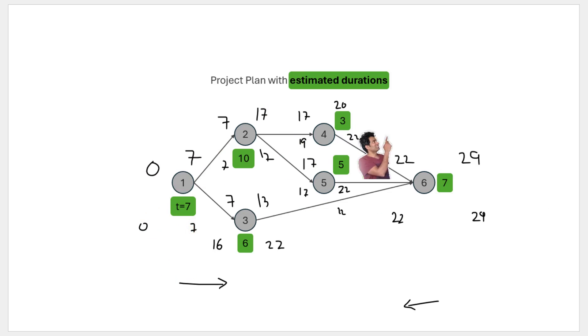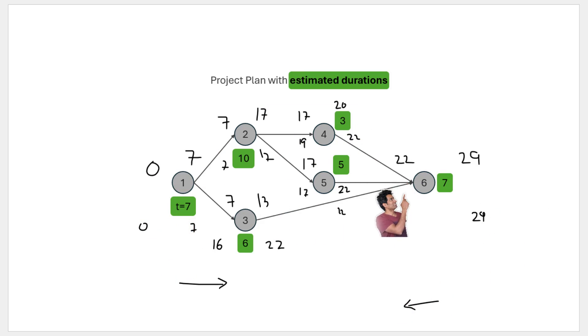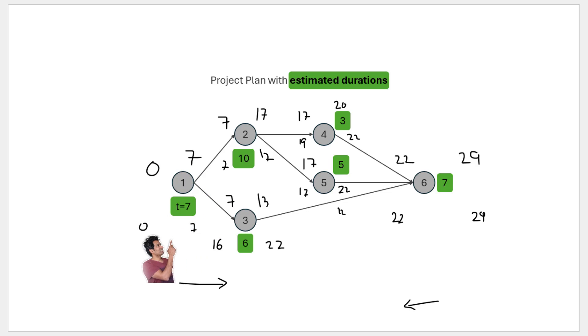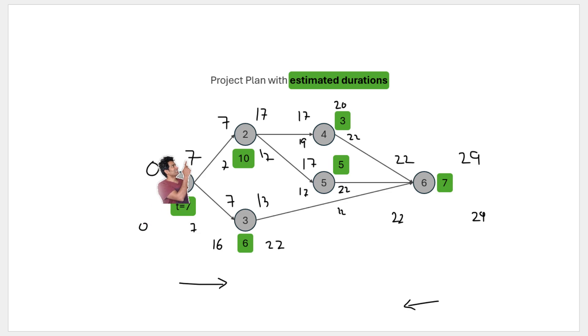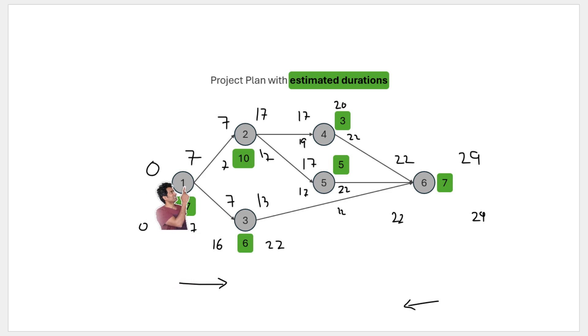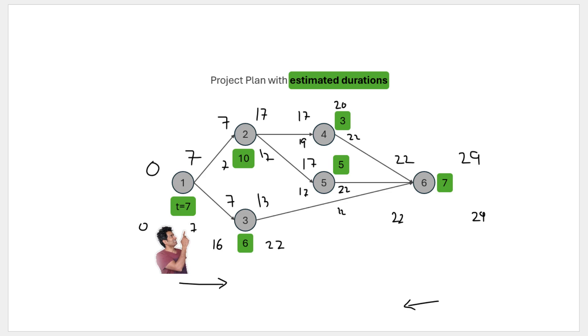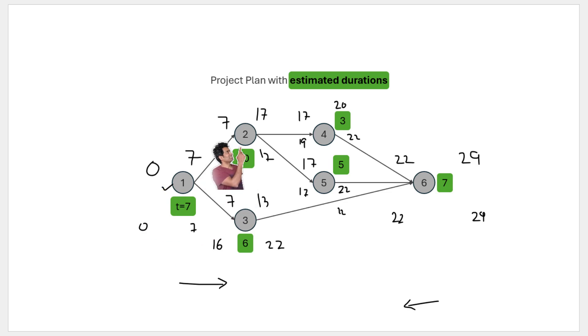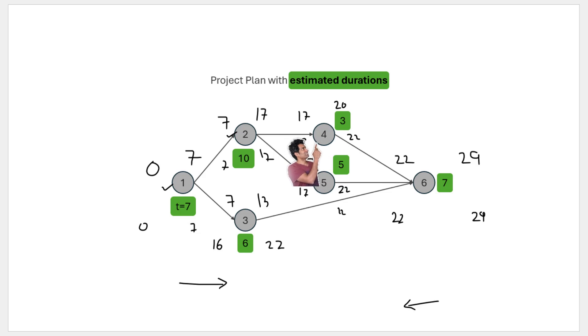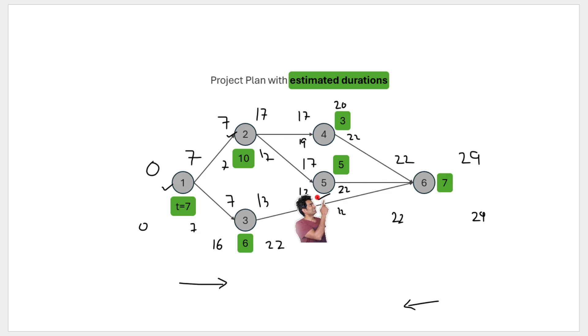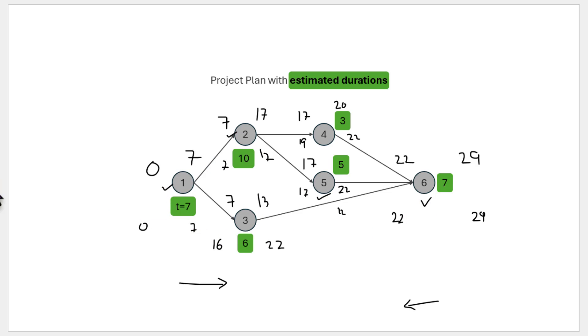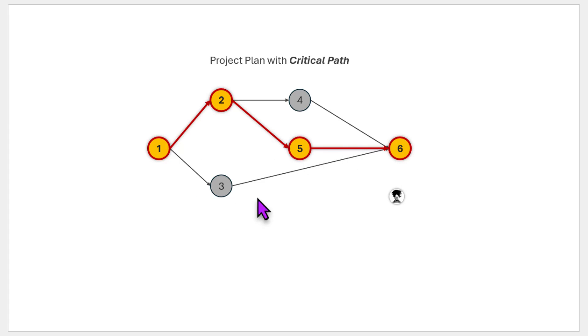Once you have all of these numbers, I know it looks like a bit of a mess, then the activities on critical path will pretty much have the same numbers top and bottom. But essentially we look for the difference between the finish values here. So seven minus seven is zero. So wherever the value difference is zero, those activities are considered to be on critical path. So we can say this guy is on critical path, 17 and 17, so this is on critical path. 20 and 22, so this is not on critical path, whereas 22 and 22, so this is on critical path, and 29 and 29, so this is on critical path. So this is the critical path for my project: one, two, five, and six.